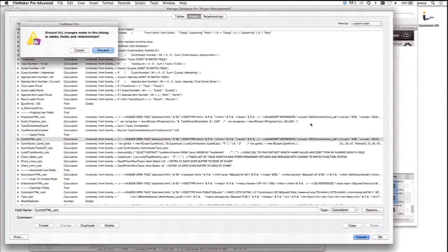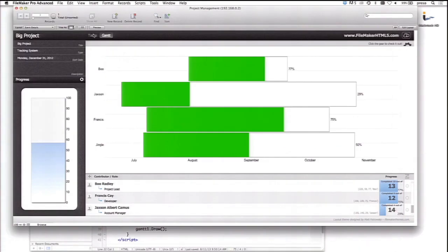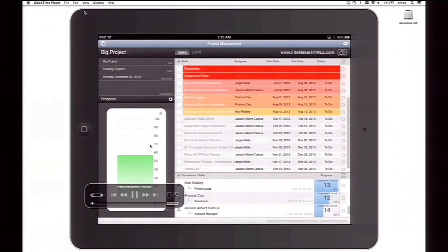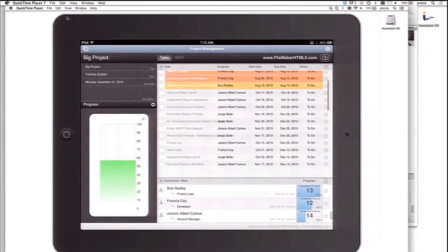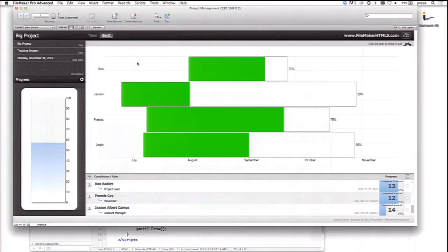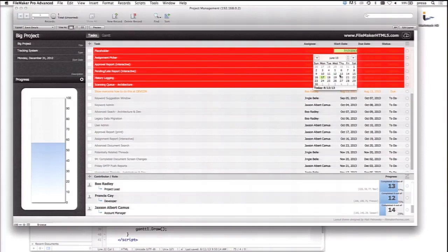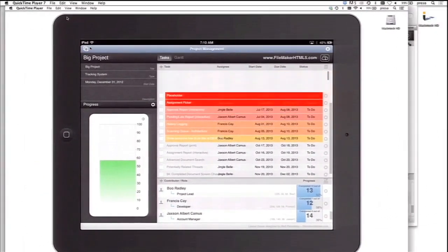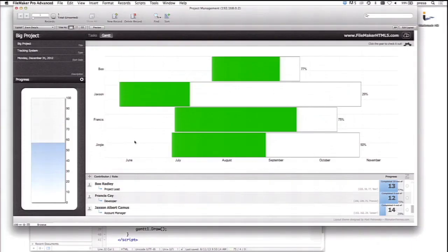And what that's doing is creating this Gantt chart. And just to show you, I have no tricks up my sleeve. See how the start date is July? Well, what if I go into the actual tasks and I say, make this June instead? Do you see how it added June automatically, and it added the new start date? So it's constantly updating. Just like my progress bar is updating, my Gantt chart can constantly update.